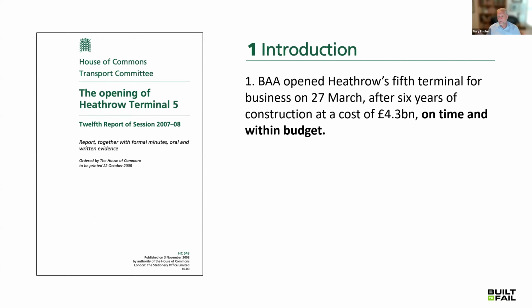As I mentioned, that investigation occurred after the project was completed by the House of Commons. This is the opening line in the report. BAA opened Heathrow Terminal 5 for business on 27 March after 6 years of construction at a cost of £4.3 billion on time and within budget. Just let that soak in. On time and within budget. I mean, really? Given the challenge and the complexity, they pulled this off. It's really, really remarkable results.